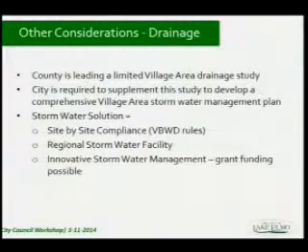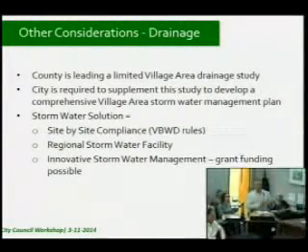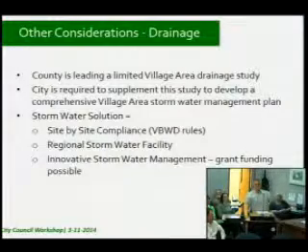Once we receive that drainage study and those proposed solutions from the county's drainage plan, we'll have an idea of how far they have to touch and what kind of system they'll be trying to put into place. Then we'll have to pick that study up and broaden it to the rest of the village and come up with that bigger picture plan of how the rest of the village is going to fit into that. That way we're working with the county, and when they move forward with a solution for their road, it fits into what we would then do with subsequent projects.